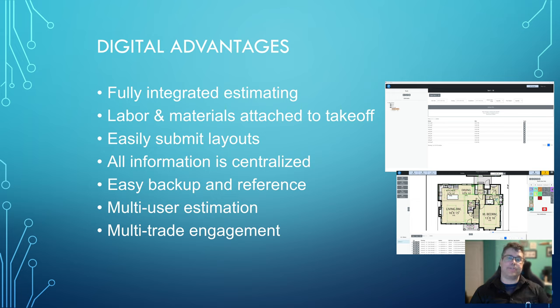Easy to submit layouts. So if you're drafting something in your estimating platform, especially in design build or custom home or anything of that nature, you've got to submit this back to the client for approval. Well, now in a fully integrated digital estimating environment, you draw it in, the system backfills the estimate for you, you submit that layout with your quote, and it is full clarity, full transparency to the client or to the team. If you're on a larger design build, all of this goes to the team and it's ready to go.